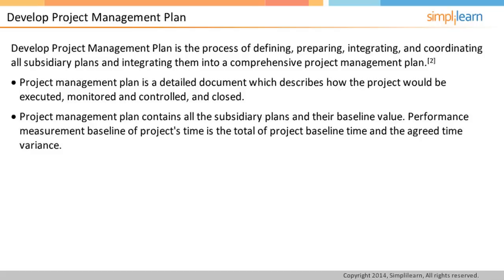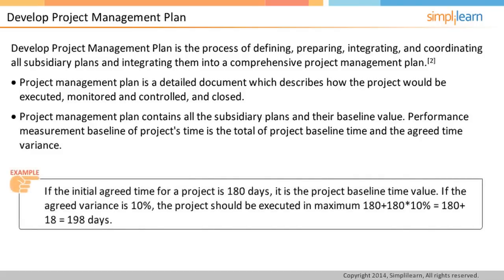Performance measurement baseline of project's time is the total of project baseline time and the agreed time variance. For example, the time management plan section would have mentioned the time taken by a project as 180 days — this 180-day period is called the baseline time value. Therefore, the baseline value is the initial agreed value in the project management plan. So if the time variance agreed in the plan is 10%, the project should be executed in maximum 180 plus 18, which is 198 days.